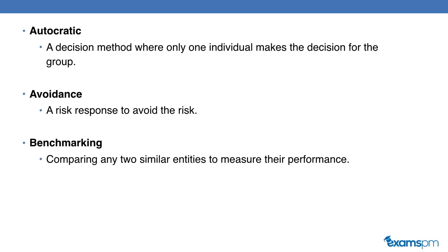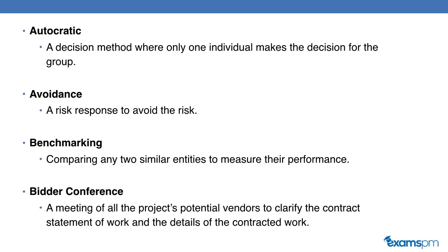Benchmarking, comparing any two similar entities to measure their performance. Bidders conference, a meeting of all the potential vendors for the project to clarify the contract statement of work and the details of the contracted work. It's important that you invite all of your vendors to the bidders conference so that everyone has access to the same information.